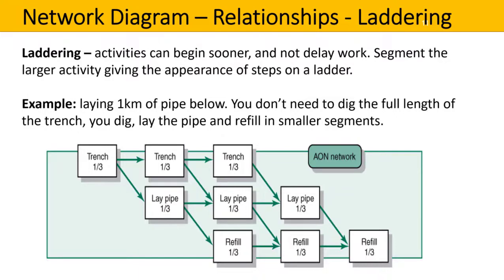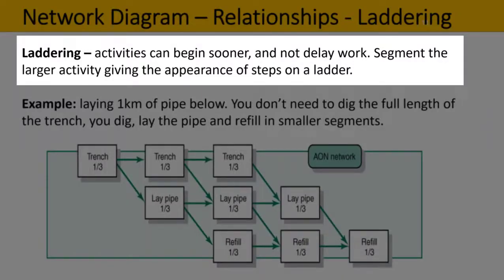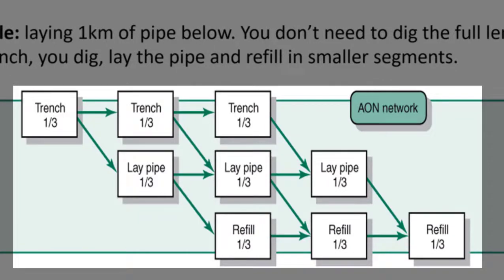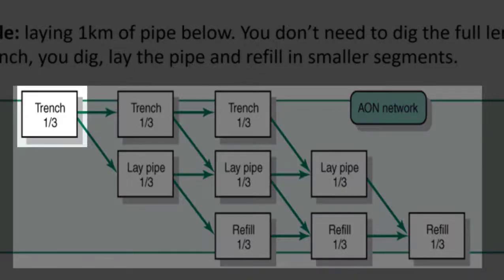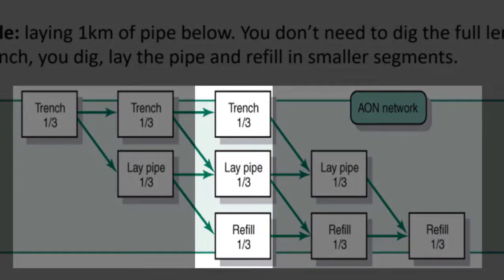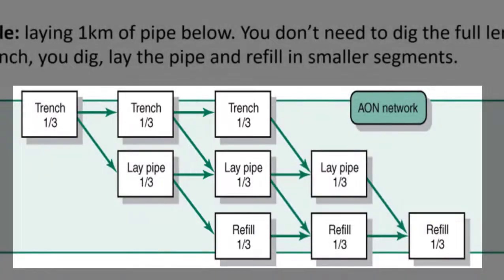Here we can use laddering. Activities can begin sooner and not delay work. You can segment the larger activity, giving the appearance of steps on a ladder. Here is our example of laying one kilometre of pipe. You don't need to dig the full length of the trench — you dig, lay the pipe and refill in smaller segments. We have split this into three parts. We start by digging the first part of the trench. When finished, we start digging the next third while laying pipe in the first third already dug. When both are done, we dig the final part while laying pipe in the second part and refilling the first, and so forth — a clear progressive overlap.